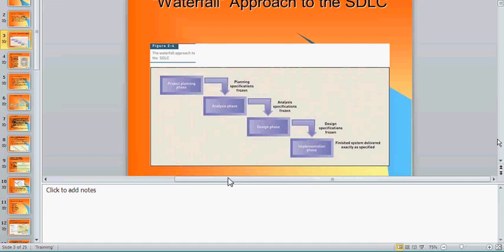When you add, edit, change, then you're adding more time. Yes or no? You'll have to go back and revisit the same documents. You'll have to go back and ask the same questions all over again. If you do some rework, can you still stick to your original timeline? No. Okay?